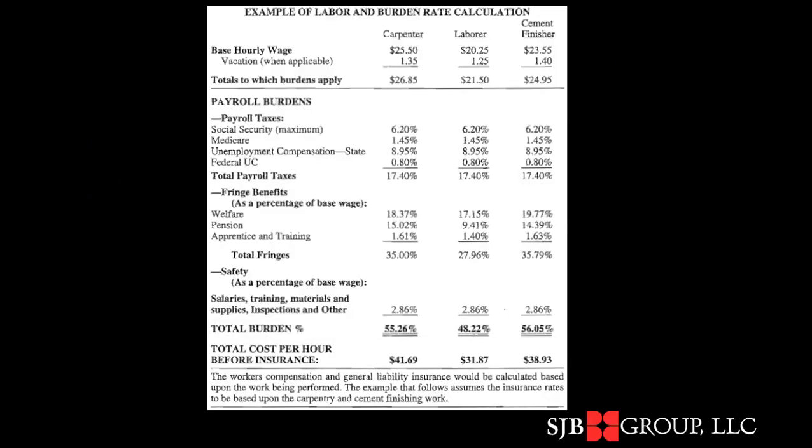I provide this outline not because it's exactly accurate. It's decent for a reference. Basically, it's direct labor across the top, and compare that to the number at the bottom after all the payroll taxes and fringe benefits and whatnot that contribute to the payroll burden amount. The lesson here is payroll burden is very significant. Next.